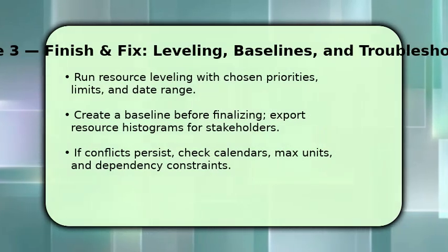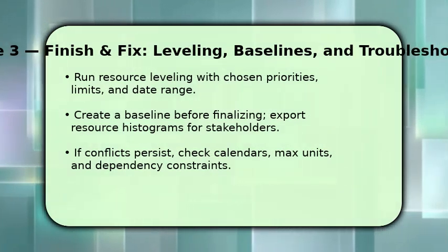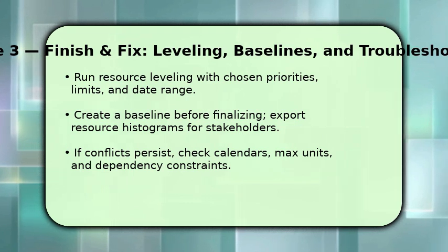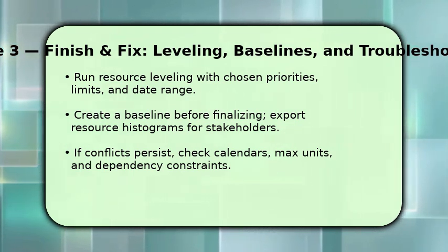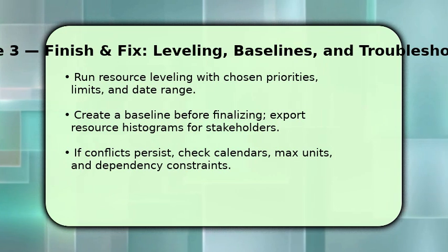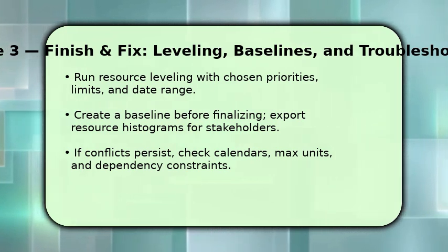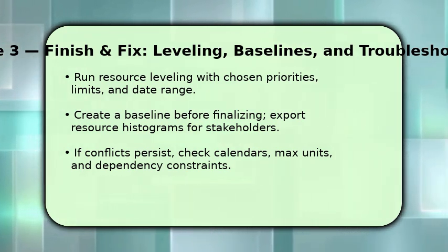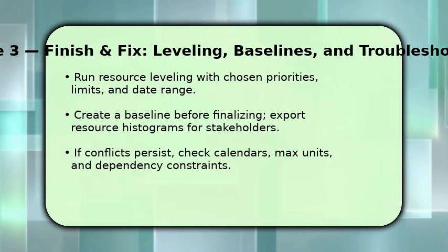Finish by stabilizing the schedule. Create a baseline, then run resource leveling with appropriate priorities, float limits, and the selected date range so P6 smooths peaks. After leveling, generate resource histograms and reports for stakeholders to confirm capacity and cost.